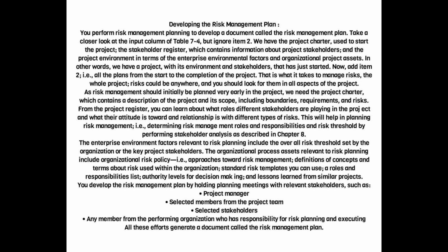You develop the risk management plan by holding planning meetings with relevant stakeholders, such as the project manager, selected members from the project team, selected stakeholders, and any member from the performing organization who has responsibility for risk planning and executing. All these efforts generate a document called the Risk Management Plan.